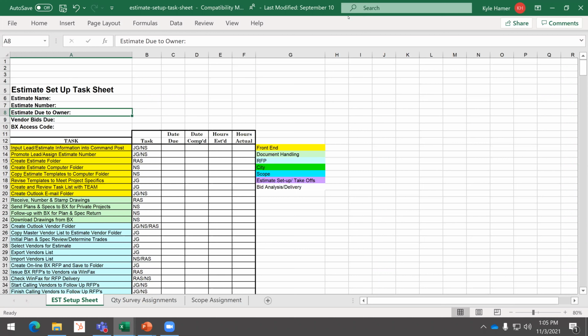So whether you have a few tasks in your company's organization or you have 300, if you are a 2-person firm or a 200-person firm, you need to come up with whatever your tasks are. The suggestion is to make sure that they are documented, that they are assignable so that you can say that Joe is going to do item 1 and Fred is going to do item 3. Also, it's a great idea to give it a due date because not everything is due on the same day in bid day. And obviously what we've done is it's really not about the chaos of bid day. It's getting you prepared to help with the chaos of bid day.